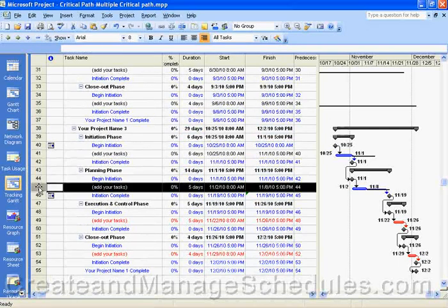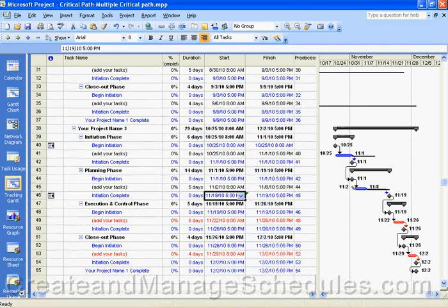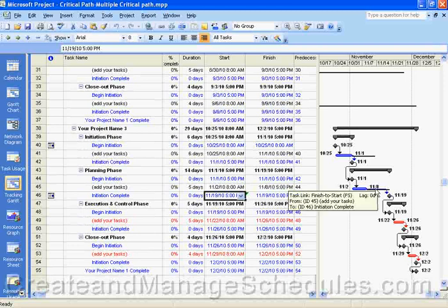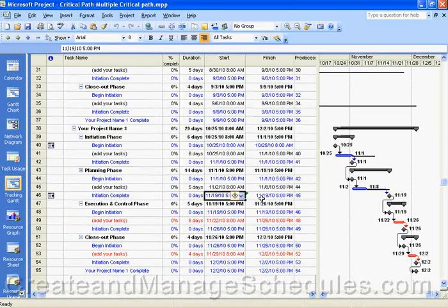Now you can see that this task has slack. It has a day here before it is supposed to be done, and you can graphically see that. Now, one of the nice things I like about the tracking Gantt view is when you mark your tasks, let's say we mark this 25%, actually make it 50 so you can see the change in the Gantt bar. You can see there's an indicator here that's increasing. There's a little thing that's showing you graphically the progress that you're making.